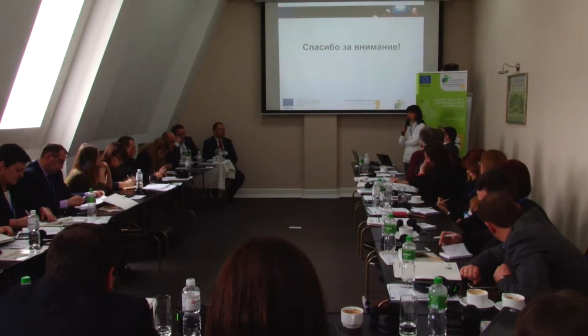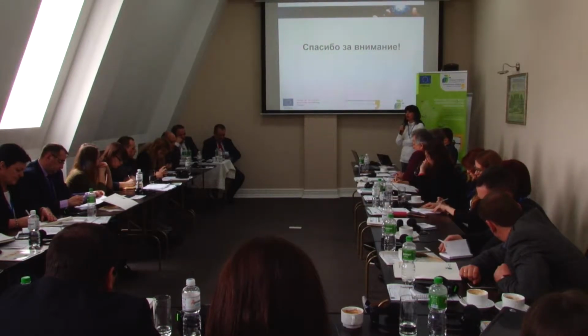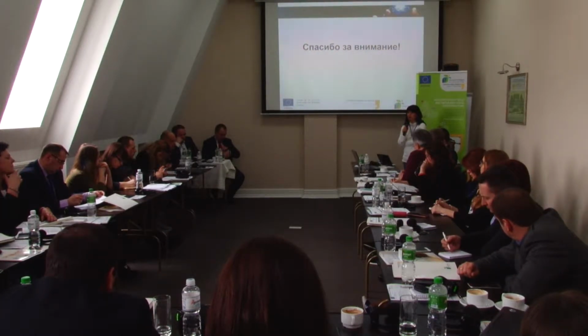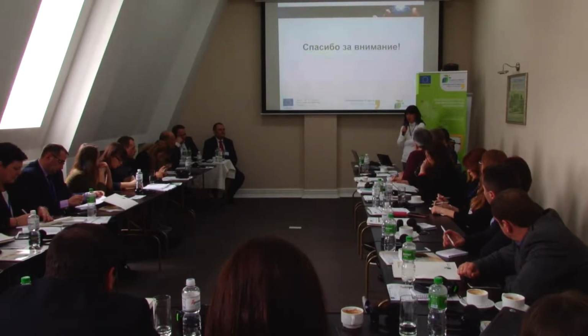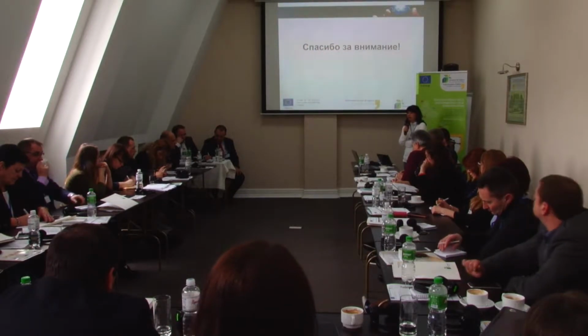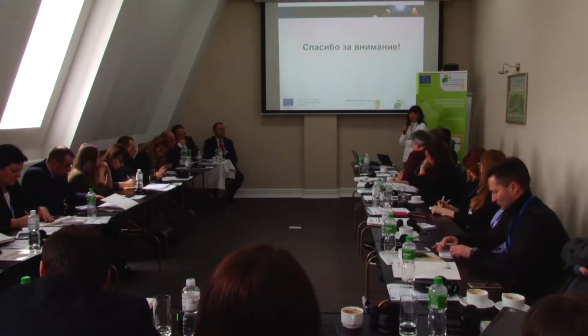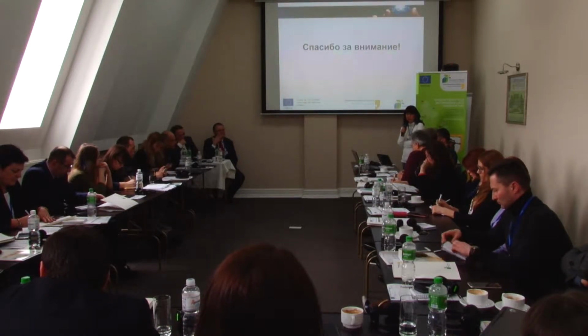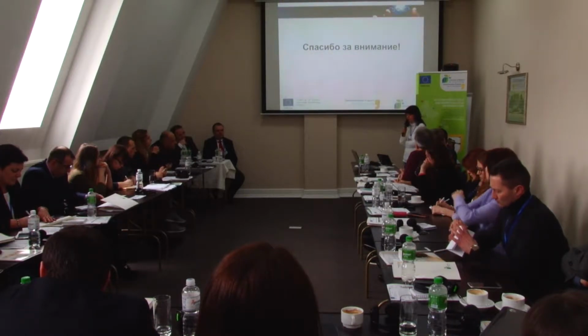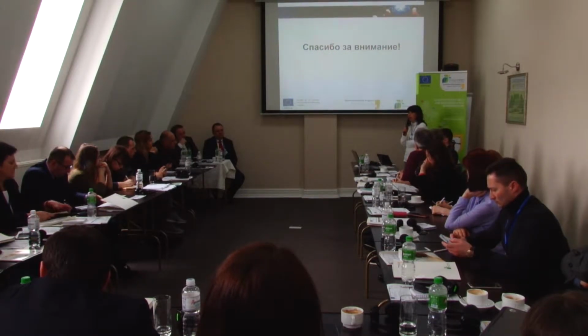And it is there that the constructing engineer should start his work, the engineer whom you will appoint as the person responsible for supervision of all the further stages and the performance of construction works, because you as the project manager don't have enough expertise to coordinate this work on a qualified basis. As the customer, you must collect all the technical conditions or technical terms related to heat and water, so that the design company has all the input data for designing.